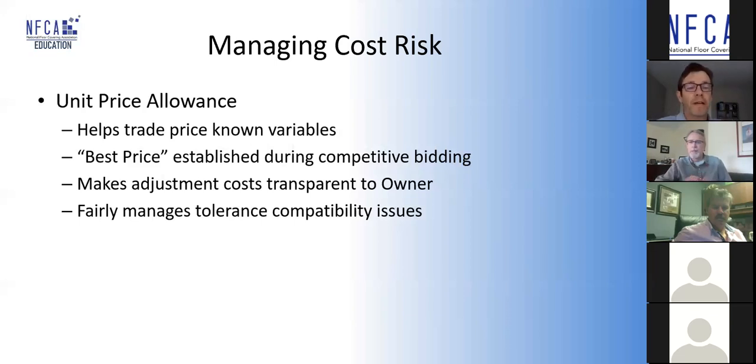It's interesting doing it this way, Keith, is better, because if you plan to get competitive pricing, you're going to get more competitive pricing. But if you don't plan for this and you have to react, suddenly you need 1,000 bags of floor leveling material and a grinder on site, and you need it like yesterday. It's going to cost you 3 times the price because it's all reactive. Yeah, you have to order materials 8 weeks in advance if you want to get it tomorrow. There are going to be some extra delivery charges for sure. Or it just might not be available. You might have to get something that you don't want, but it'll make do for the time. Yeah.